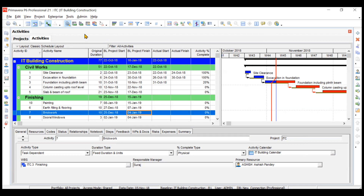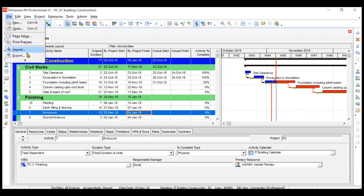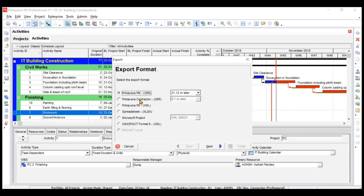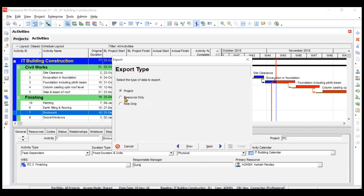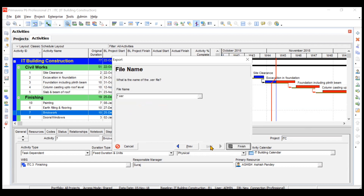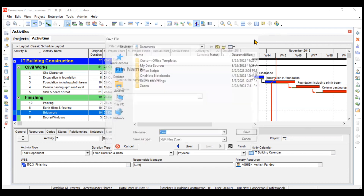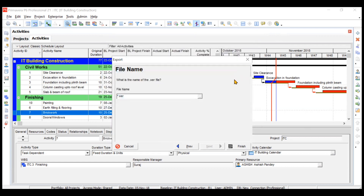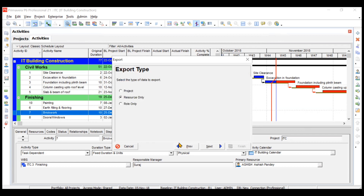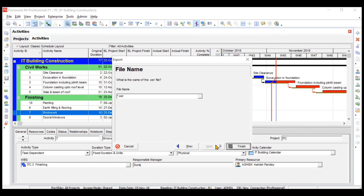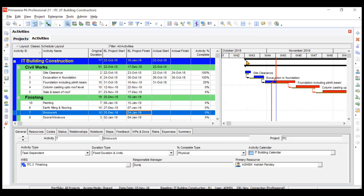This is how you export projects in Primavera in any available format. Similarly, you can export resources and roles. For resources, go to Next, choose the file name and location, and it will export your resources. For roles, do the same — click Next and Finish to export the roles. That's all for this video. Thank you.